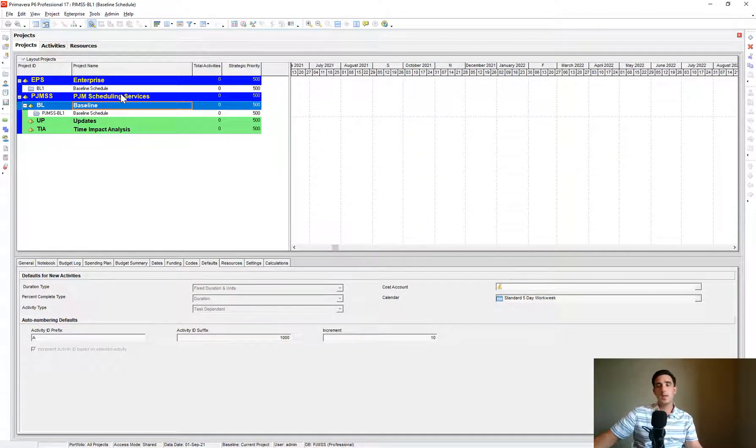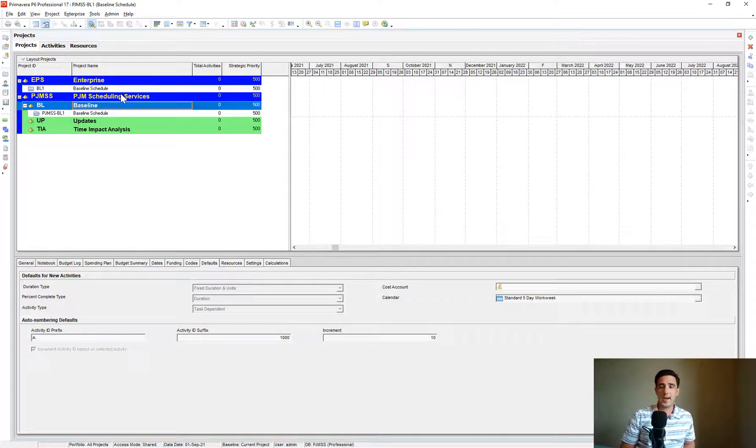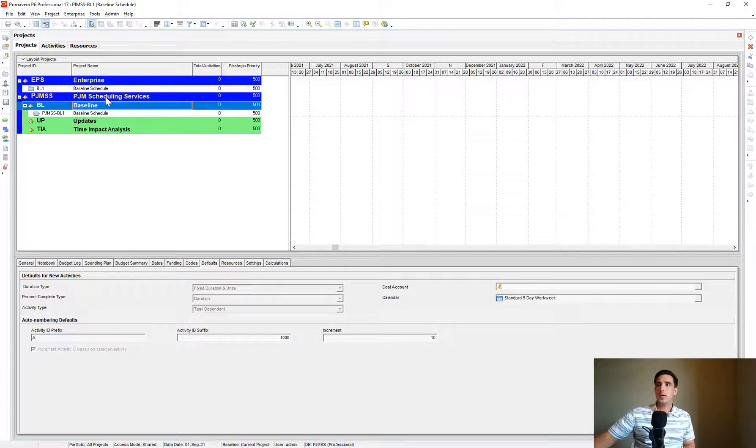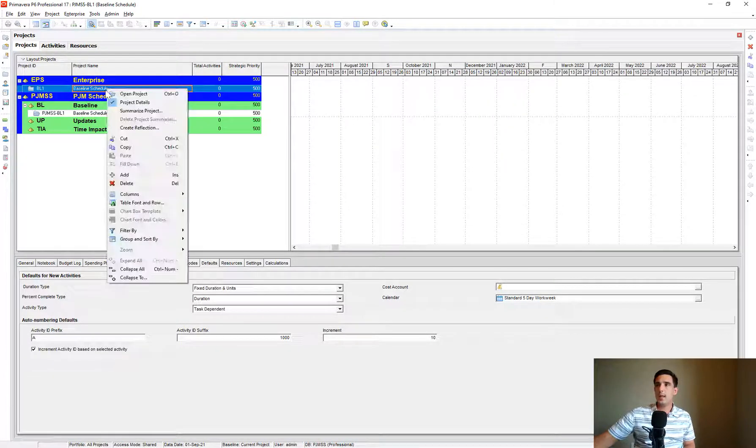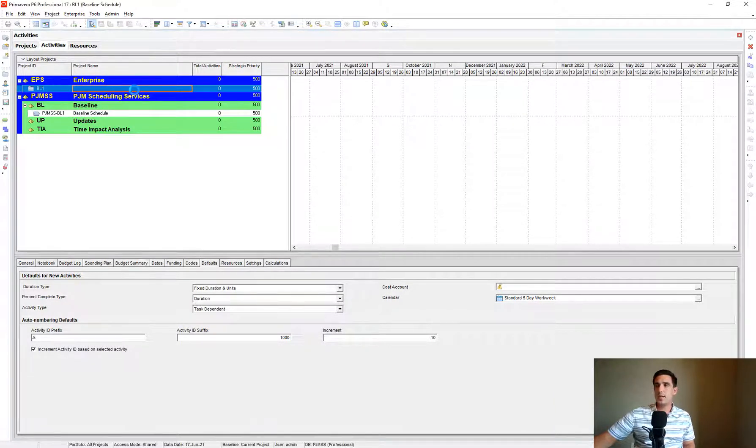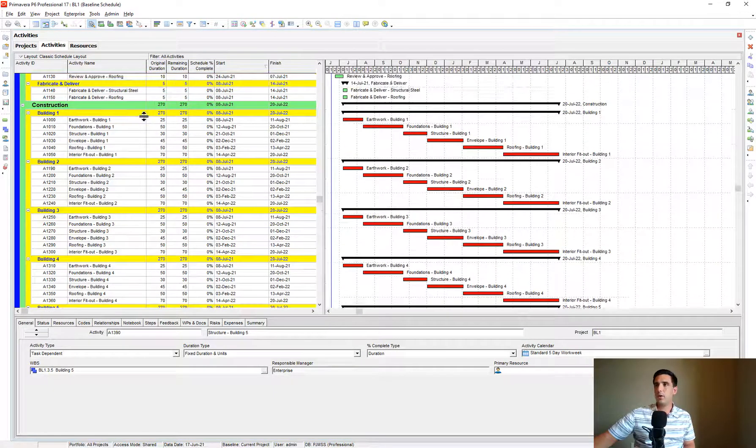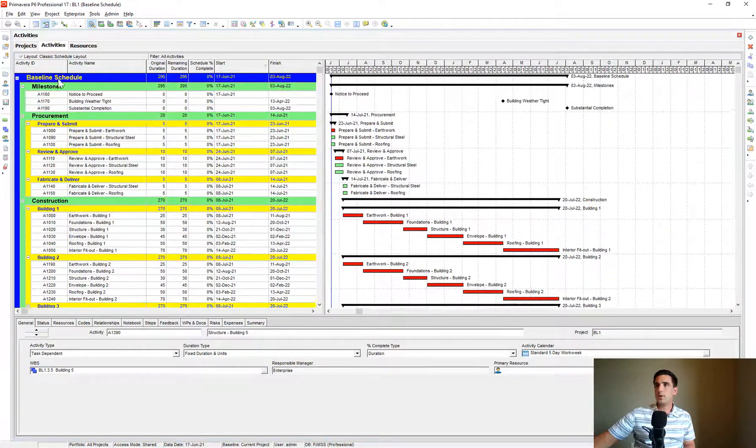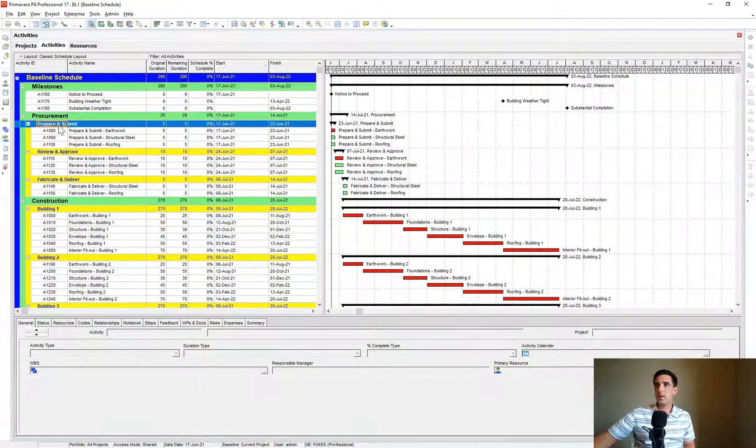We want to have an organizational structure for our activities when we add them. In our example project that we're aiming to create right now, the Work Breakdown Structure looks like this. We have Milestones, Procurement, Prepare and Submit.